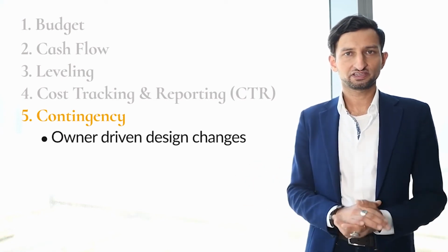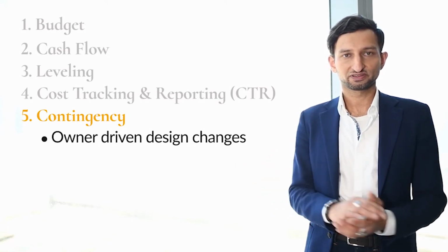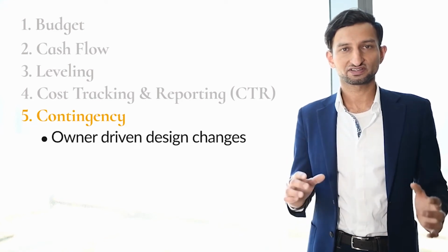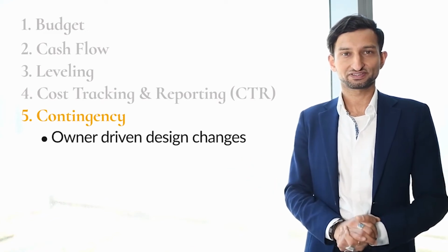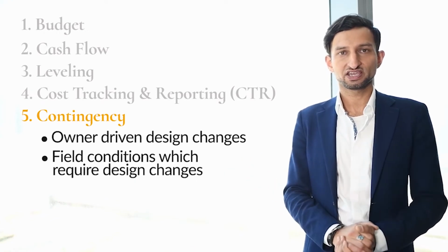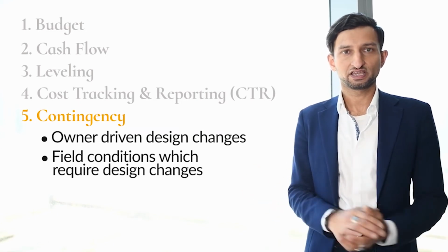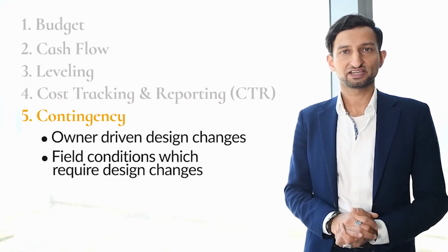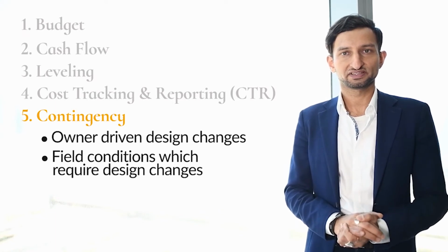If, say, early, midway, or near the end of the project, an owner or manager would like to change the build-out and scope, the design and construction team will require additional costs to coordinate it and build, since these are owner-requested changes. Next, we have field conditions that necessitate changes to the design and the planned construction. For instance, a duct, sprinkler line, or electrical conduit may be in conflict with the planned installation and require one or all of those items to be relocated or redesigned.